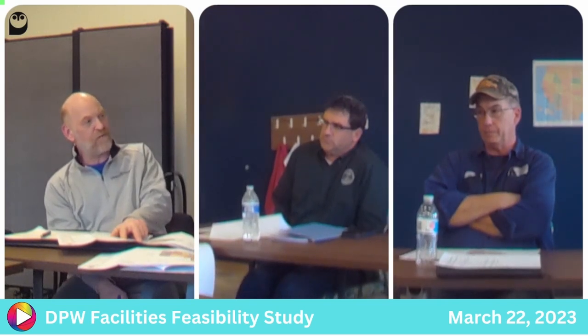I will say many projects start off with a smaller one, and either they are able to get that in based on what the bids are as an alternate, or they put it into a change order during construction, which ends up being pretty expensive. Yeah, that becomes gold. Or can it be phased in?